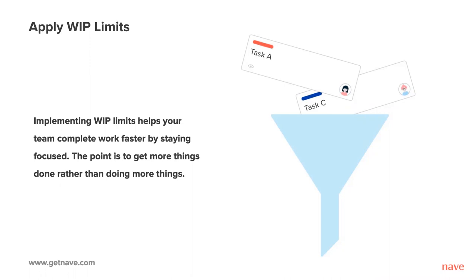Jira provides the option to set WIP limits on each status on your Kanban board, which is a good starting point. If you use Trello, there is a power-up called List Limits Power-Up that lets you set WIP limits for each work-in-progress list in your board.